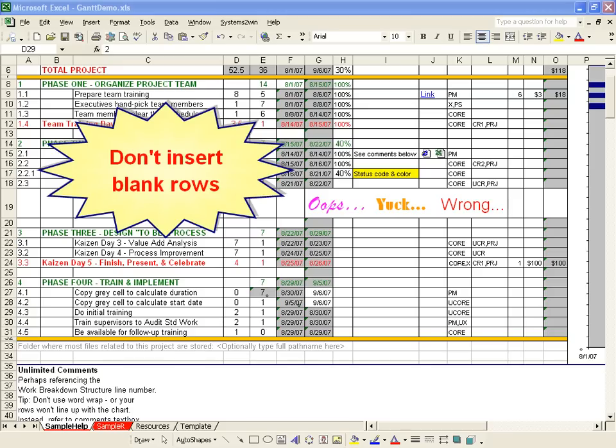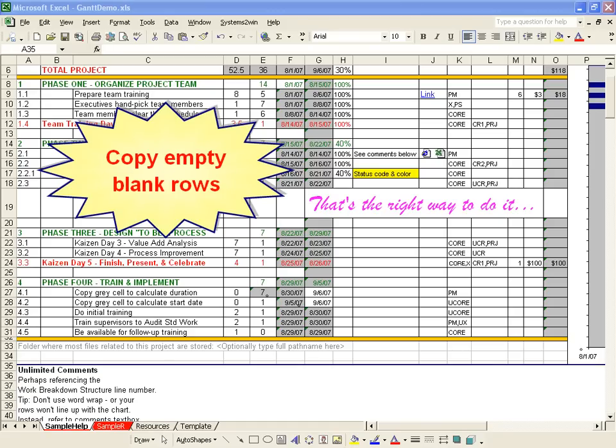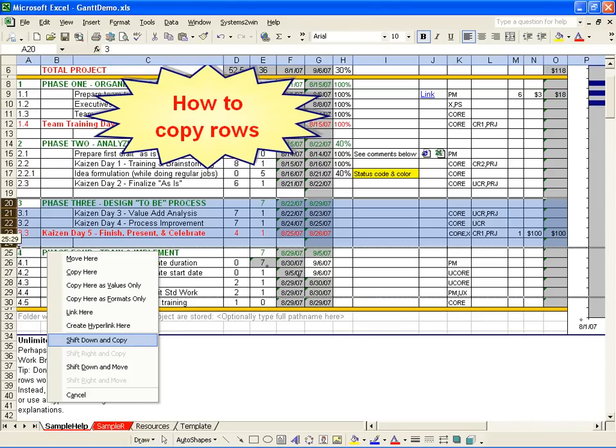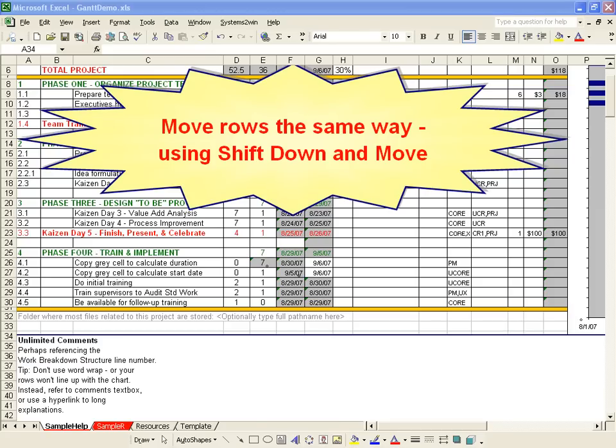The single most important thing to remember when using a Systems2Win Gantt chart is: do not insert blank rows. Instead, you want to copy empty blank rows that contain the formatting and formulas that you need. You use Shift-Down and Copy to do that, and there is a separate training video on how to do it. That's also the right way to move rows.